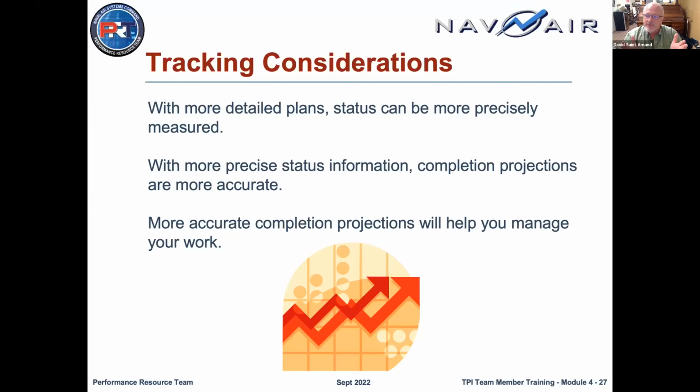But over the course of a 4-year project, they delivered within a month of when they thought they were originally going to deliver, because they'd broken that set of requirements down into smaller and smaller sizes of tasks, and then they monitored that carefully. They knew where they were, and they knew when they needed to spend a little more effort to get caught up, when they could just sail along comfortably, and they did very well. The teams that Brad and Christiane are coaching have done this for a while. They do a lot of pre-work, and 3 half days typically gets the planning for the next work cycle complete, and they deliver what they say when they say they're going to deliver it.